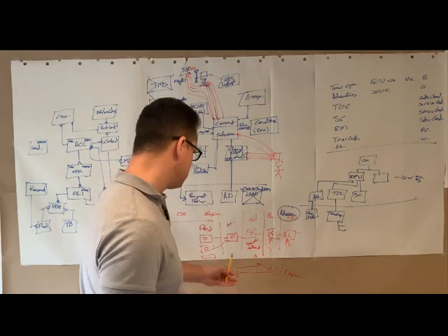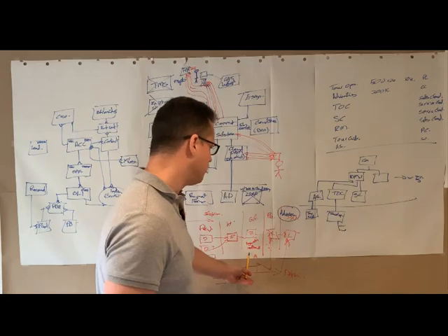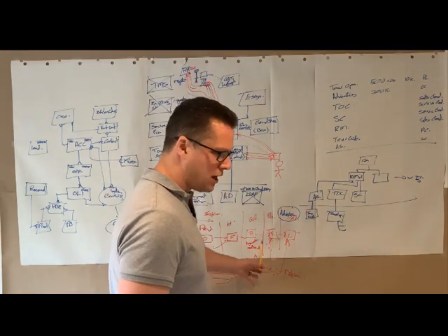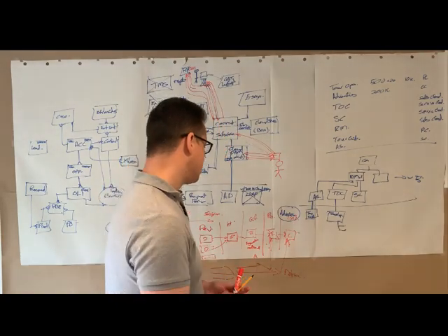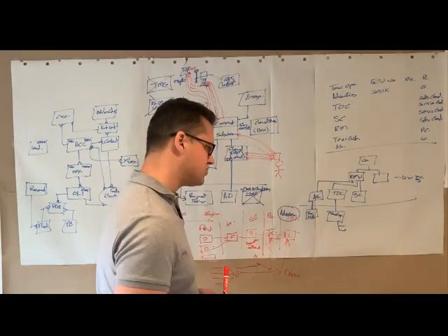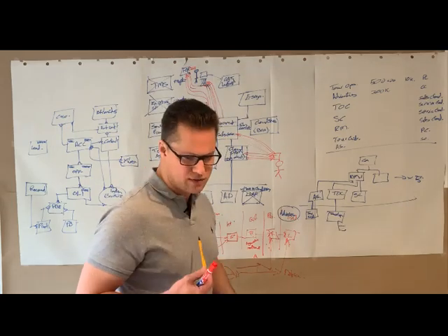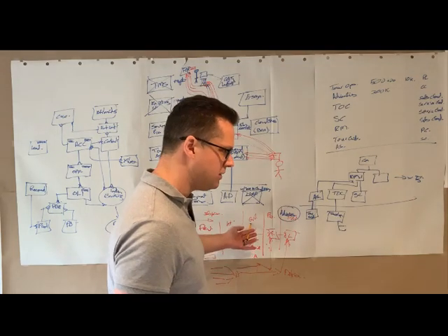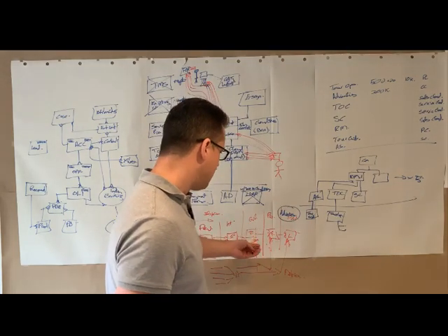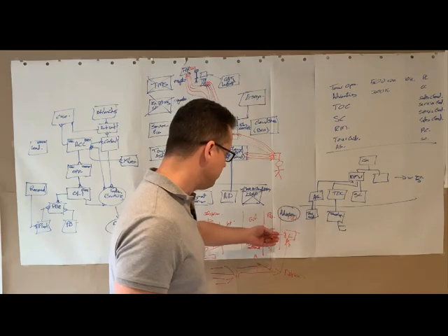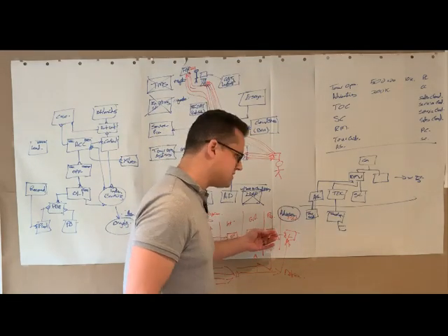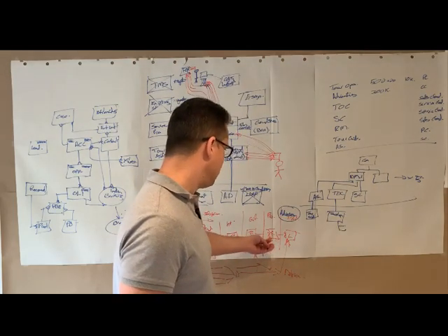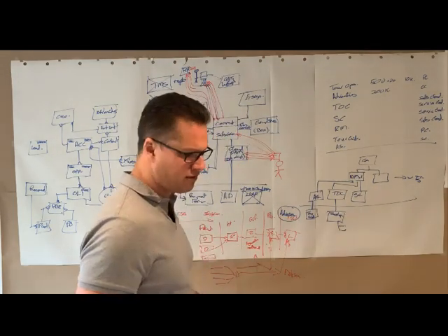Integration testing with other systems would, I would see, take place in what I'm calling the QA environment. In terms of user acceptance testing, I think it can happen in a couple of places depending on the context. In the scenario it was talking about concern over making sure that there was accountability and sign-off. So I would propose that would take place within the QA environment so that we're then on solid ground as we move into the pre-prod environment. In terms of end user acceptance and training, that could take place in our pre-prod environment.